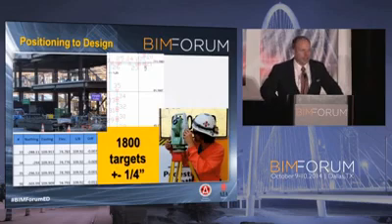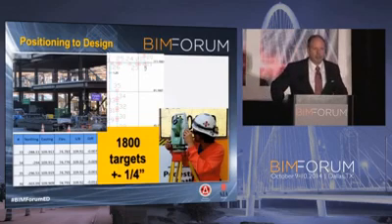And our guys are positioning the steel exactly where it needs to be. All the edge form, you can see up in the upper right-hand corner, came out pre-welded, was fabricated at the shop. The tolerance that this is all being put in is within plus or minus 1/4 of an inch. It does start to get to the point where you're speeding this up, and it's getting to be like an assembly line.